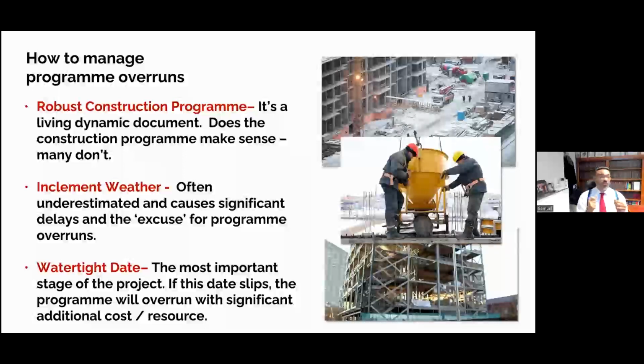Once you pick up the construction program, invite the contractor to give you an information release schedule, because they should be able to deduce from the program that they've done, we're required information for this on this day, on that date, on that date. Now, some contractors will turn around and tell you we require all the information on day one. Of course, they can't have all the information on day one.